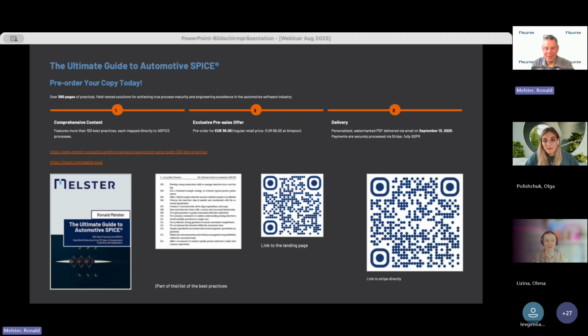Yes, you're touching one topic we have not talked about yet, which is the push or pull principle. Is providing some information in the SharePoint sufficient, or do we need to bring it to someone? Again, it's a little bit like the sender-receiver thing needs to be defined. For some important documents, there is the push principle. So putting it in a SharePoint is maybe not sufficient for all of the documents. As you can see, this communication evidence is a very sophisticated topic. But it could be acceptable if, for example, a software architecture release has been communicated during a project team meeting, and we have an entry in the meeting minutes.